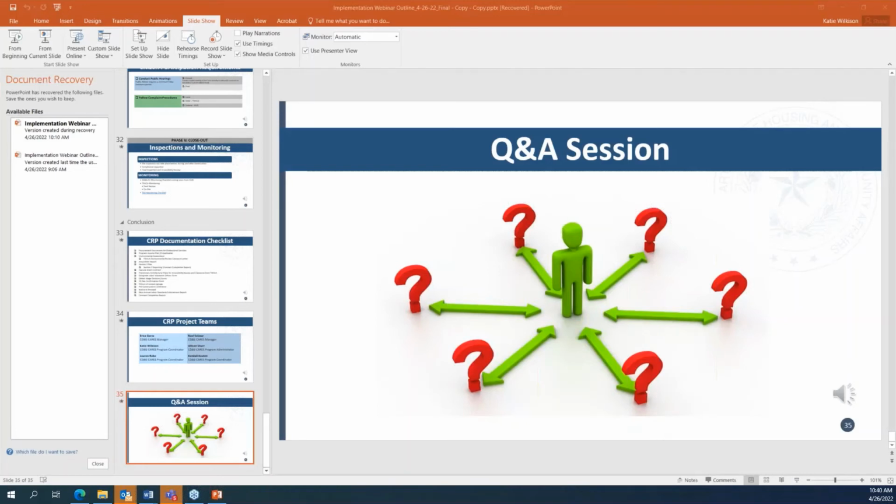And no, you won't need to submit it that way. On our slide, we mentioned that you'll be emailing it to TDHCA staff. Again, on the environmental, the environmental specialist at TDHCA, Jacqueline, wants to look at it before you publish. So email her a copy before you publish.